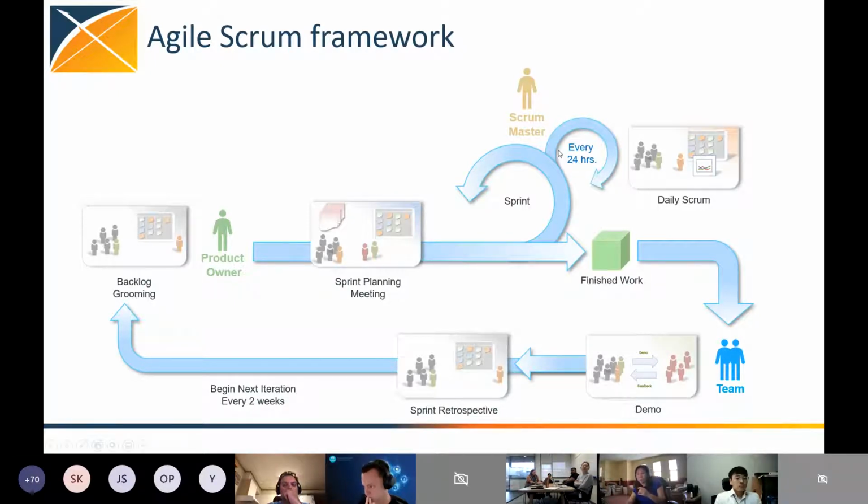We have the Scrum Master, or in other terms, the project manager, but in Agile Scrum, it's really the Scrum Master, not the project manager, because some of the project management stuff actually falls under the product owner. But it's a person who helps to make sure things are on target and that the schedule is being kept, right? And then you have the rest of the team. So your medical coders can go in here, your development team would go in there. So those are who they are. We have 5 ceremonies, and these 5 ceremonies are repeated every 2 weeks.